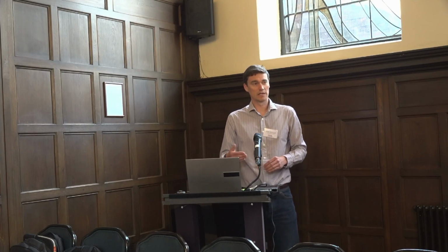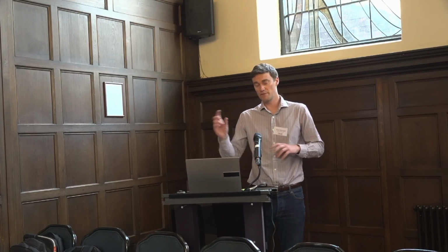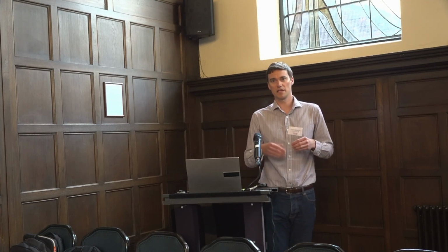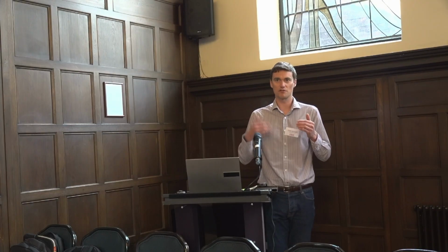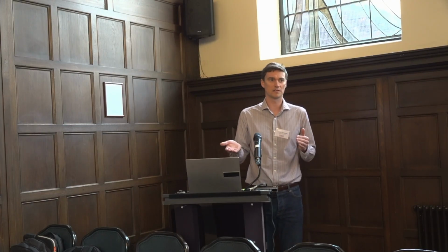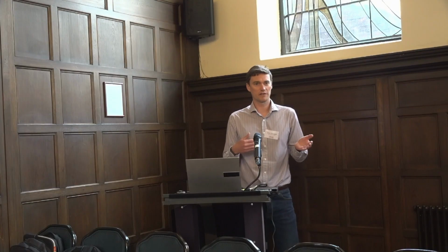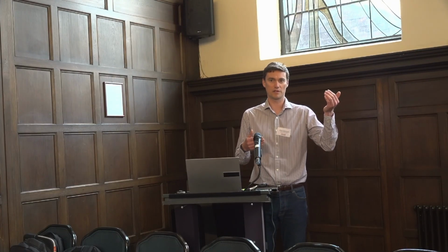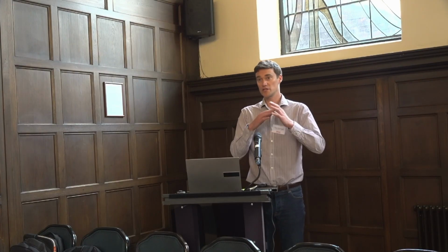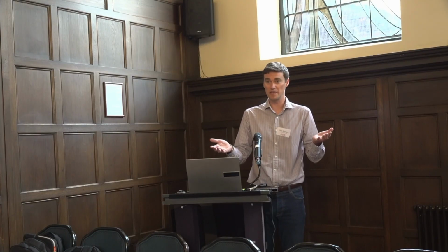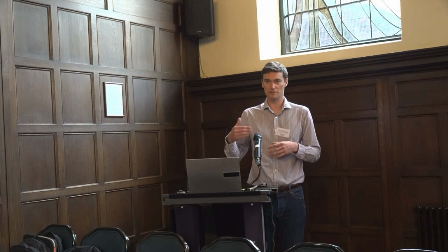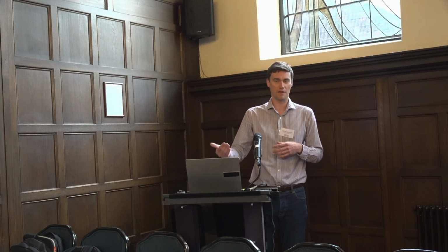Now, the other side of PAS 2080, just briefly, and Fraser showed you with the forecast and actual, is that you are obligated in PAS 2080 to essentially demonstrate improvement through the lifetime of the project. That is irritating in that it requires double entry, because you have to have a forecast carbon footprint, which is: if we just carried on and delivered this project as business as usual, this is what we think the outcome would have been. And then we end up in the actual record, which is truly what happened on this project, if that makes sense.